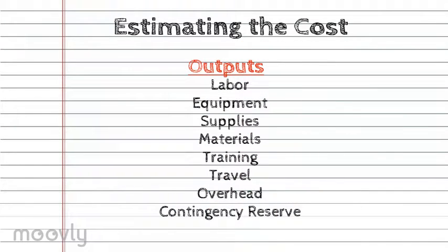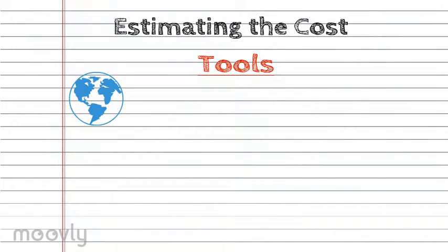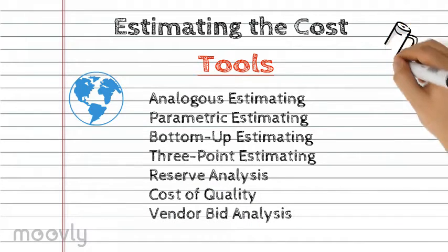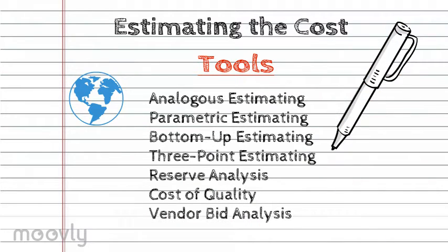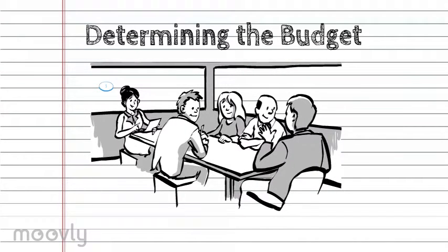The inputs include the work breakdown schedule, human resources, the risk register, the cost management plan, of course, for bigger projects, and it's included with determining the budget when it's a smaller project. The outputs pretty much are just the costs, so this includes anything from labor to supplies, materials.